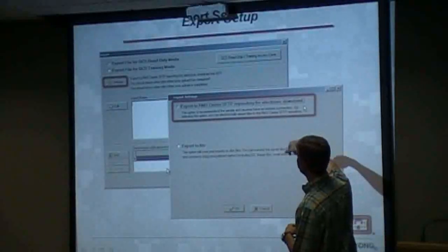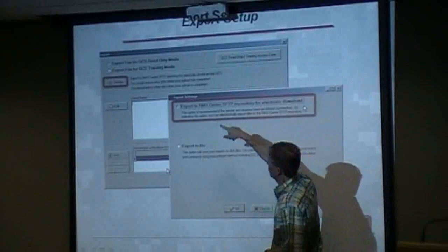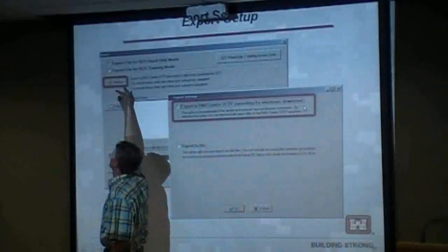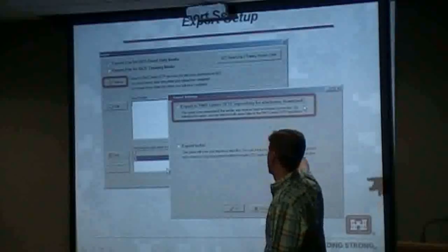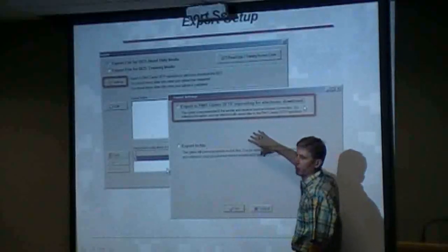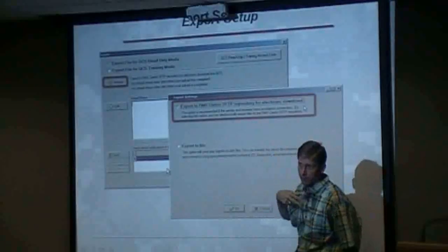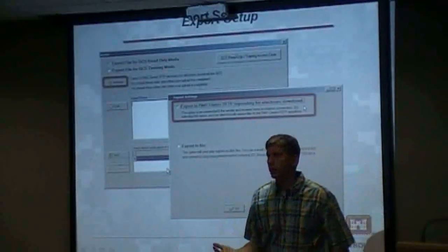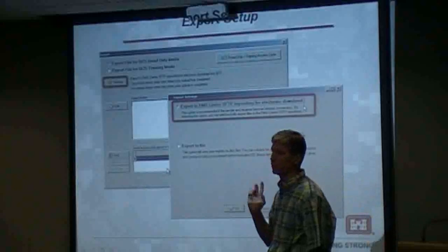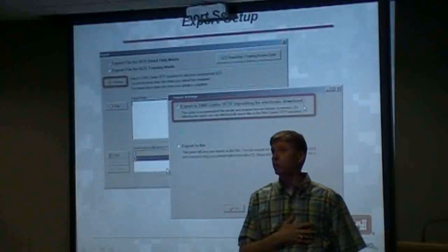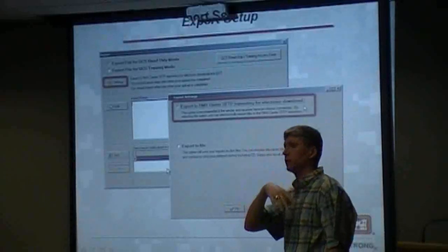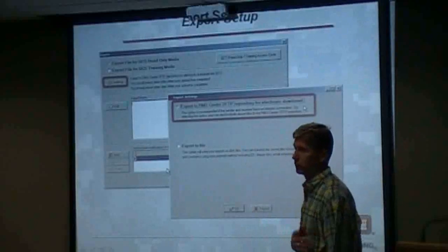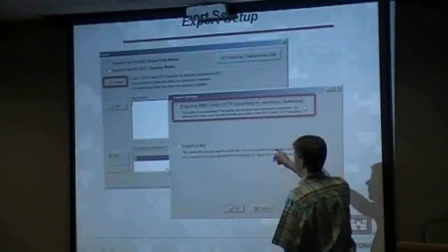For exports to the RMS FTP repository, hit Settings — that's something you want to check right off the bat. If you're not getting exports or updates, the settings may be set to export to a file. We can't use USB drives anymore, and there's no reason to use CD since we have a secure FTP server, unless you cannot get internet connectivity in a very remote location.